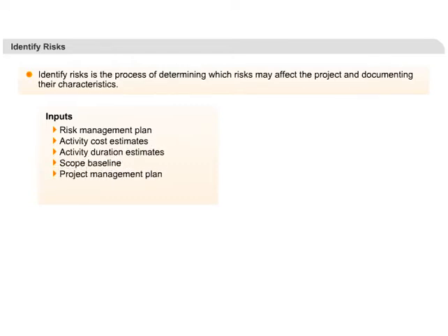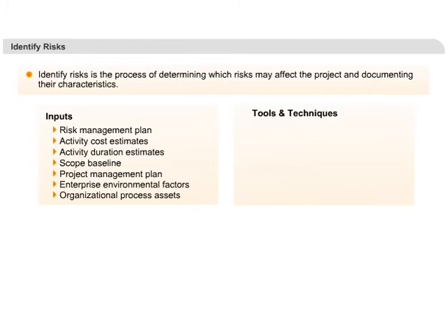But generally, the project team should look for possible risks in the project management plan, project schedule, cost, and scope data. If the organization has executed similar projects in the past, the project manager can look at old project archives to look for some possible risks. Sometimes risks can be identified from industry studies or surveys, and that's why enterprise environmental factors are also listed as an input. There are various techniques for risk analysis.